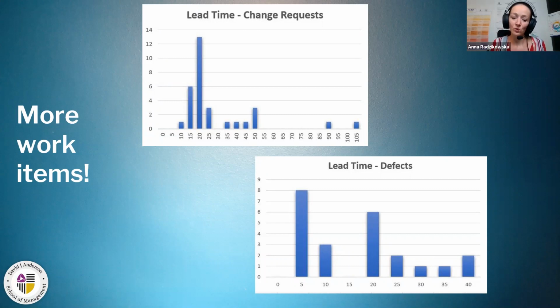And if we're able to solve the defects and to test them and prove that it's working, we could include the resolution in the next delivery window, which was in the next weeks. If we were not able to do it, then this defect had to wait another 2 weeks for the next delivery window.